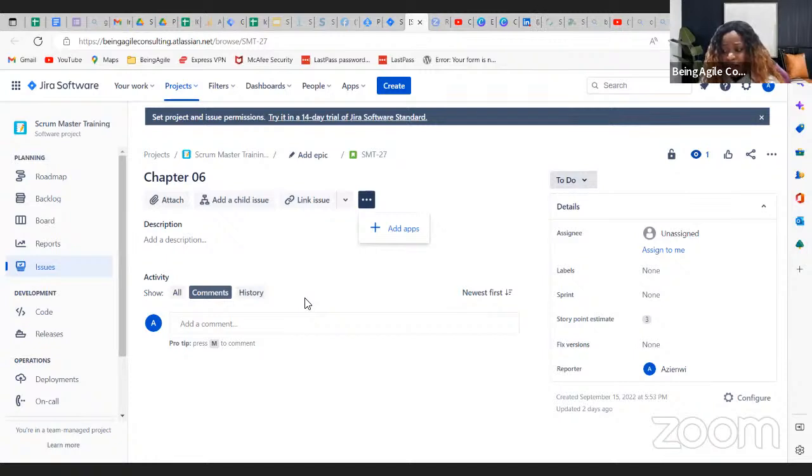And then for the development, the person doing the development may say, okay, I think it's going to take me 3 hours to do the development. The person doing the testing too may say the same, so they're entering all those individual hours at that task level. Now, let's focus on Jira. They will enter those tasks on all of the stories that they are bringing into the sprints, and then Jira will automatically do the math for them and sum up the total. That's how you'll be able to see the total hours that are required to do the work.